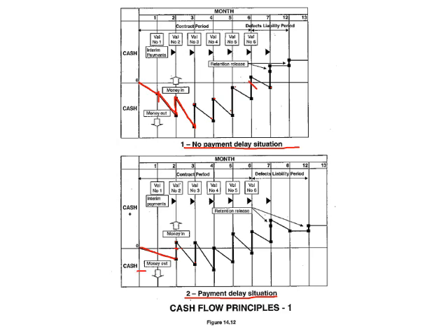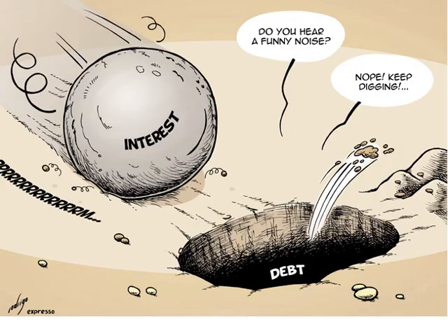So the amount of money that you have to borrow to finance this project is actually lessened, whereas you would have had to borrow that amount of money. Now at one stage you only have to have this amount as stated. Okay, and the main thing about getting this alleviated is to prevent as much interest as possible, because interest eats into your actual profit. Okay.